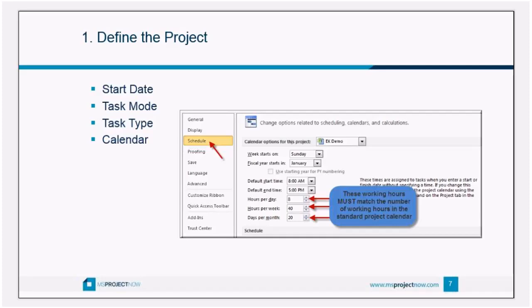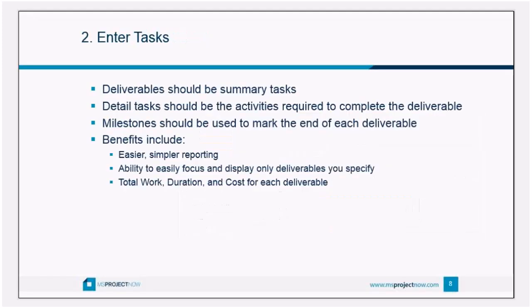So we talked about the options: defining the project, start date, task mode and task type, setting or applying a different calendar. Step two is entering your tasks. If you've been using Microsoft Project at all, you know where to enter tasks, but there are best practices to be aware of. First, identify your deliverables — hopefully before you touch Microsoft Project you're building a work breakdown structure outside of Project, identifying the major and sub-deliverables.